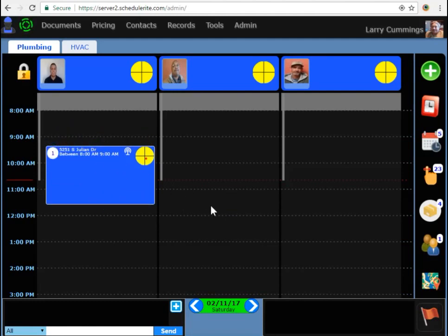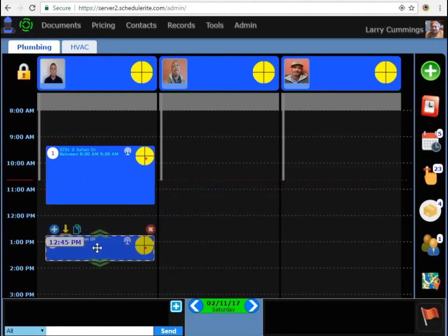If a project needs another job visit, we can press the blue copy button. This will create a duplicate job that is linked to the same project. Because the job was created in this way, it will not show an expected arrive time. You will need to open the job and set the arrive time for this new job.